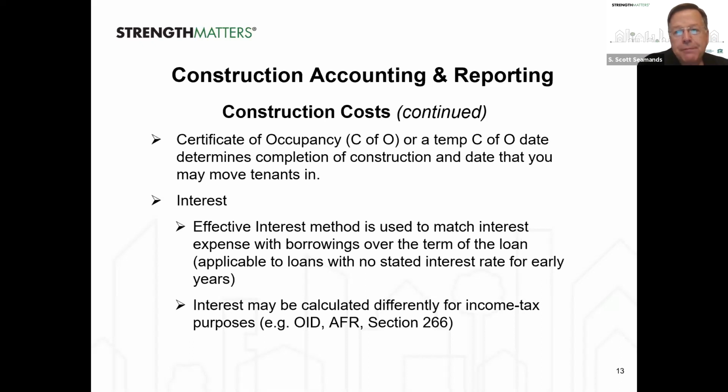But more often, the rehabs are actually done as a rolling rehab, where you're doing a few units, you move people out of those few units, and then when they're done, you move them back in, and then you start on another few units, and you kind of roll through the building, gradually rehabbing unit by unit. This makes it much more challenging to decide when your construction periods begin and end. But the way I think about it is each unit really has its own mini construction period.